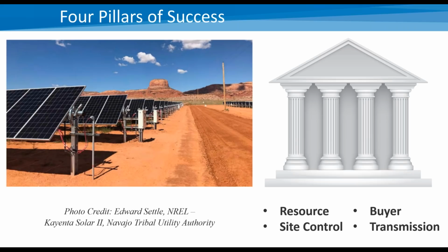So you have the site, you have the resource, you have an offtake agreement, you have permits, you choose your technology, you pull together your team, and you secure the capital. And so that's one way to think of it. And if you just search for SROPTTC online and with NREL, you'll probably find some sort of a project development guidance document, presentations, and so forth that kind of discuss that particular approach.